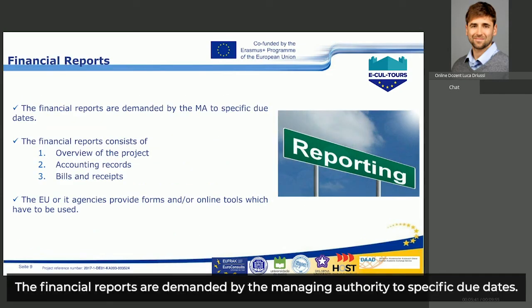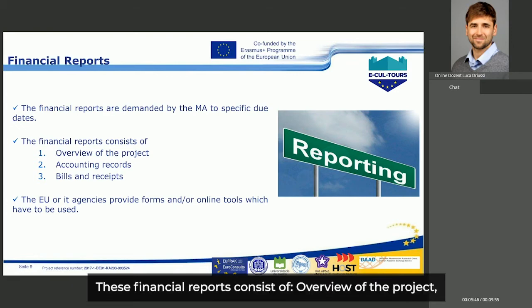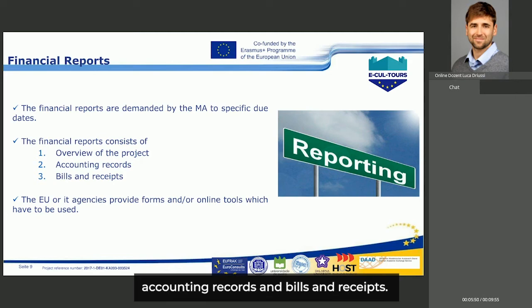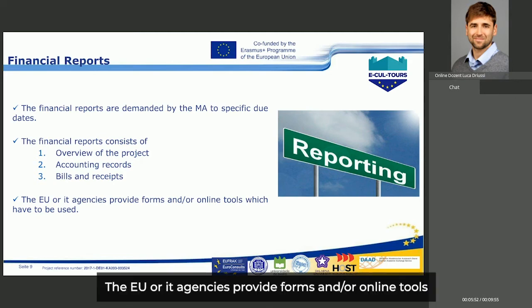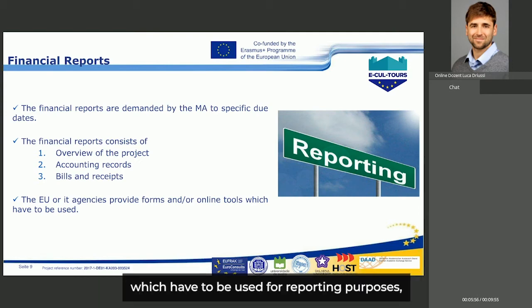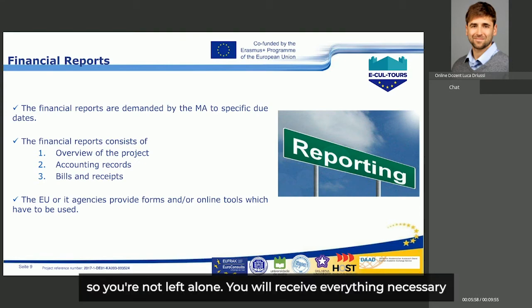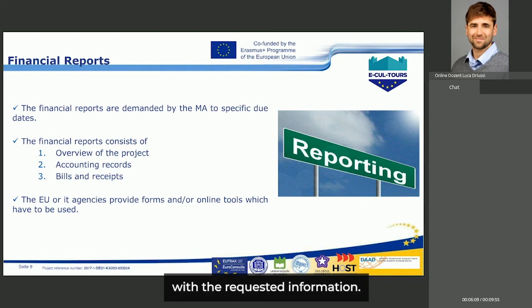The financial reports are demanded by the managing authority at specific due dates. These financial reports consist of an overview of the project, accounting records, and bills and receipts. The EU or its agency provides forms and/or online tools which have to be used for reporting purposes. So you're not left alone. You will receive everything necessary to fulfill these reports, but you will then have to fill them with the requested information.